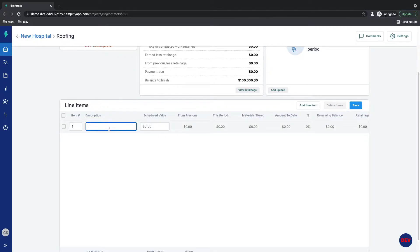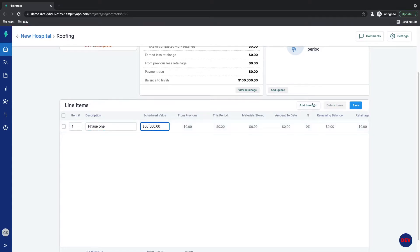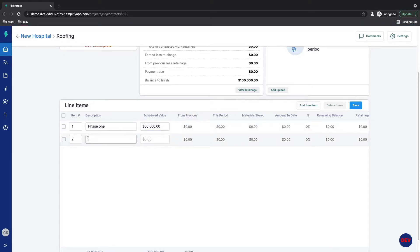Then type in the description. We'll call it Phase 1 for $50,000. And from this point, you can add as many line items as you want until your schedule of values is complete.